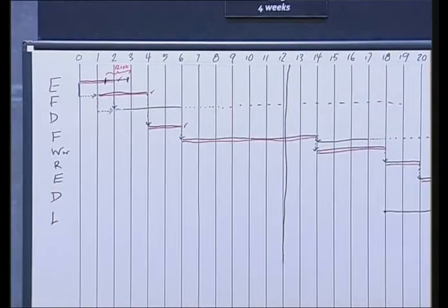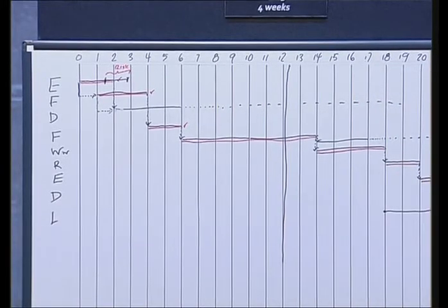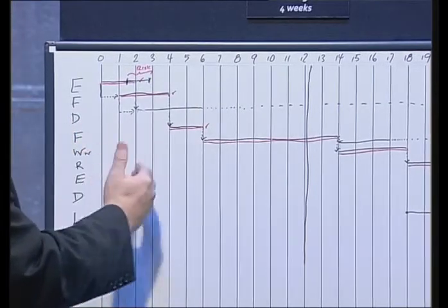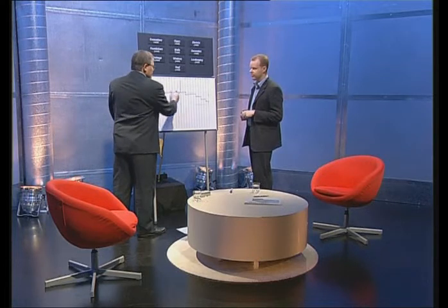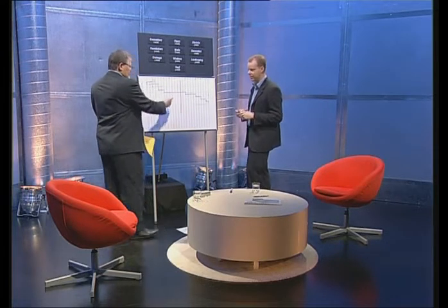The benefit of that is it means that midway through the year you can make an assessment of how many more projects you could start commencing and investing in more houses. So this is a process of constant monitoring. So you start with a best guesstimate, and then you constantly appraise the actuality throughout the project, the process, to fine-tune things further along the chain. Is that right? Exactly. The initial plan needs to be drawn up much like this.